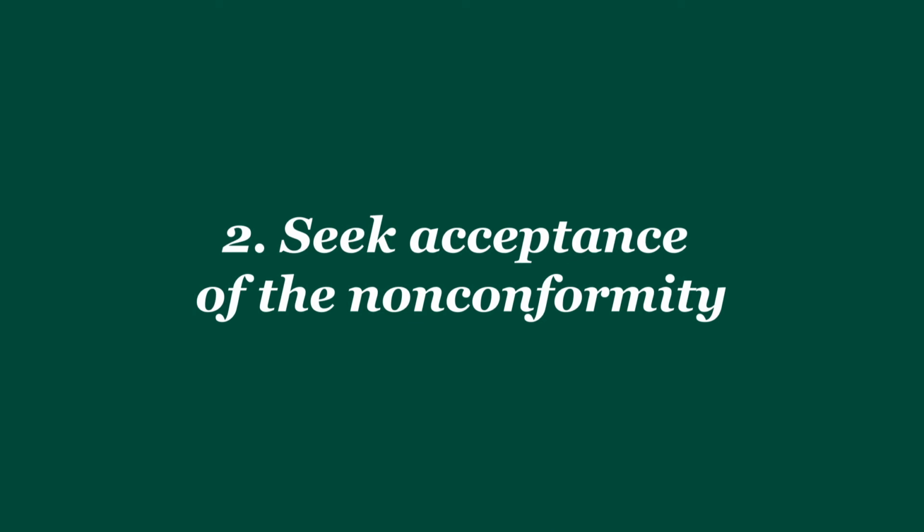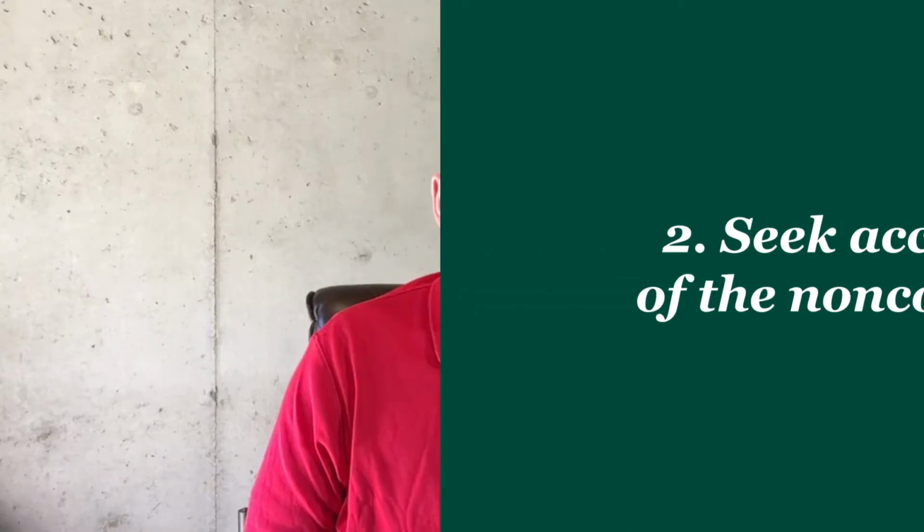Second, you can seek the architect or owner's representative's acceptance of the nonconformity without correction. This must be in writing. It will result in project approval for what is known as a limited certification, which means the project is certified and the architect or owner's acceptance is acknowledged on the certificate.